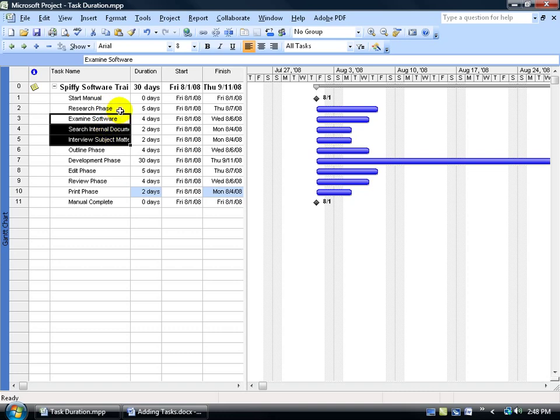because I may have more subtasks for my research phase summary task. Even so, even if I go ahead and convert this and show Microsoft that this is a summary task, I can still make changes. So just know the flexibility of that. For right now, I'm going to go ahead and assign the numbers to my phases, and then when I do later on add additional subtasks, the moment that I convert this into a summary task where Microsoft recognizes it as such, it'll actually wipe out the numbers here and do what the project summary task is doing up above. In other words, it will wipe the number for the research phase and just keep track as a summary task for all the detail subtasks listed below.